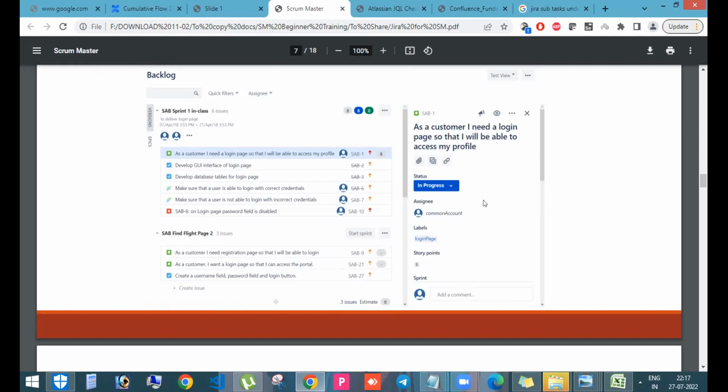So when I went to the backlog, I am able to see all the stories which I have created. Then there is an option called create a sprint. Then I created sprint 1 and gave the description. From the backlog items, as per the priority, I am able to move the user stories from backlog to sprint 1. Correct. When will you do that?